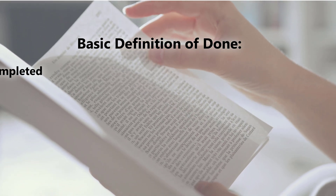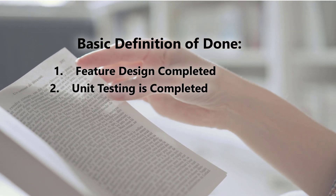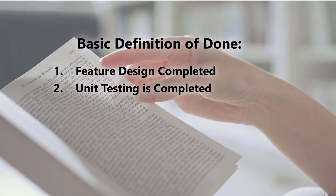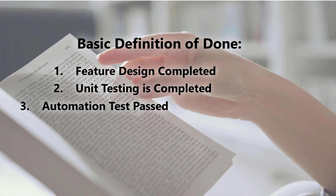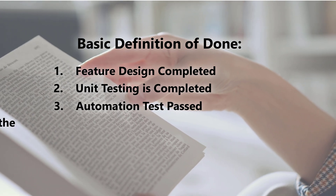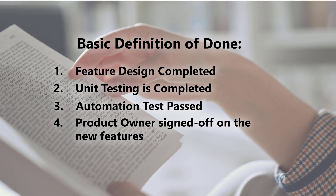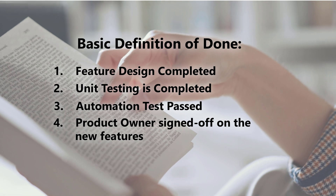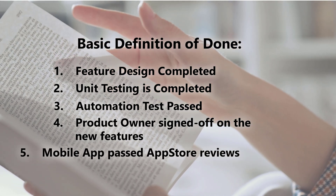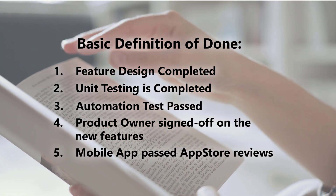Here is a sample basic definition of done consisting of five checklist items: number one, feature design completed; number two, unit testing is completed; number three, automation test passed; number four, product owner signed off on new features; and number five, mobile app passed App Store reviews.